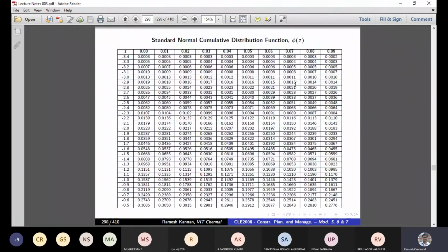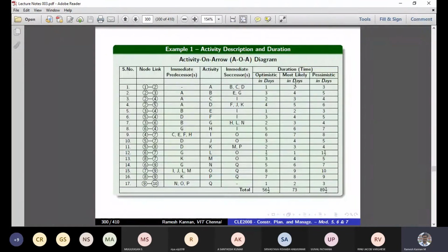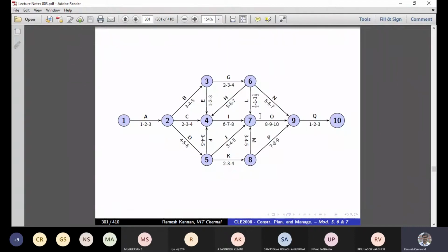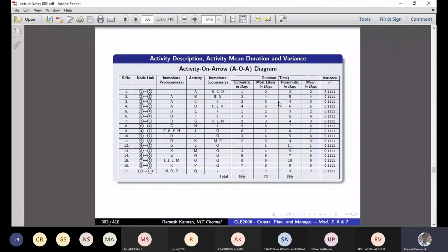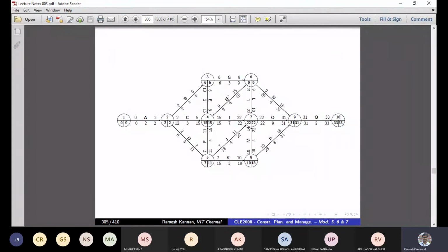One exemption I gave in PERT is that since PERT is a pretty big problem, you don't have to really find the float durations or other aspects like in the critical path method. But in this case you can calculate the effective duration. Then you can find the critical path duration like in CPM, or you can even find the longest path duration.